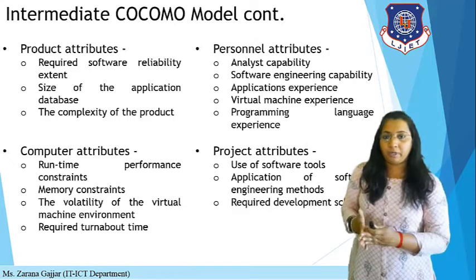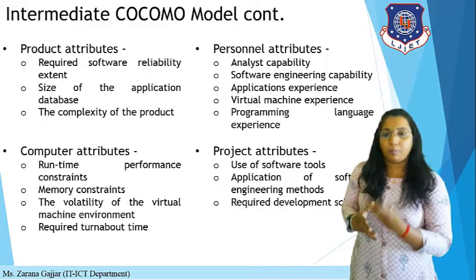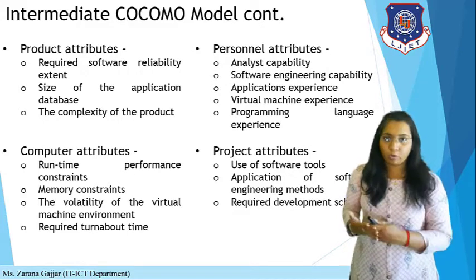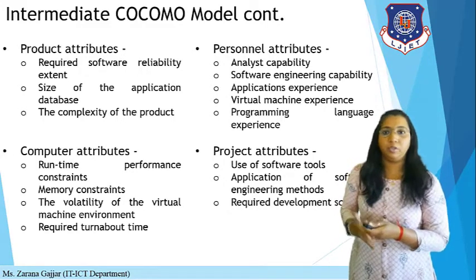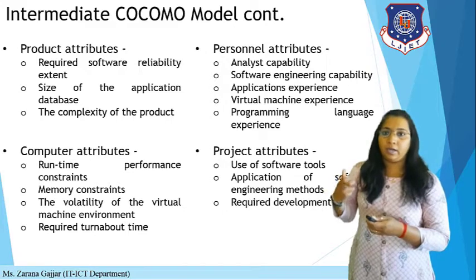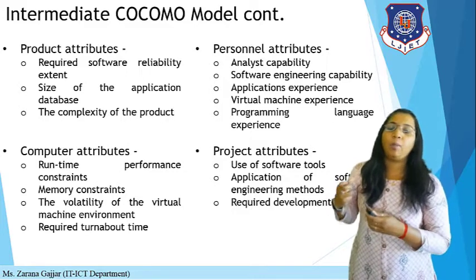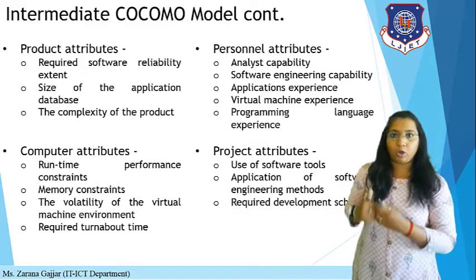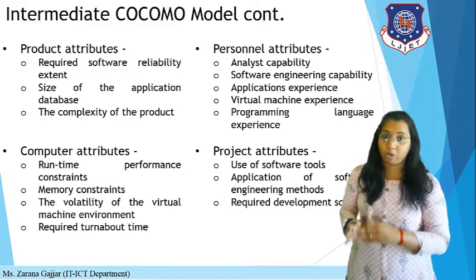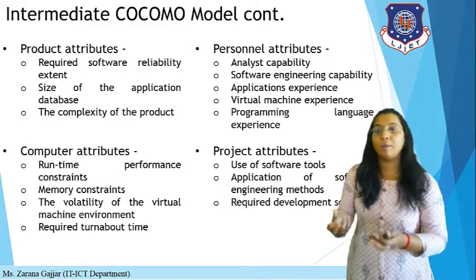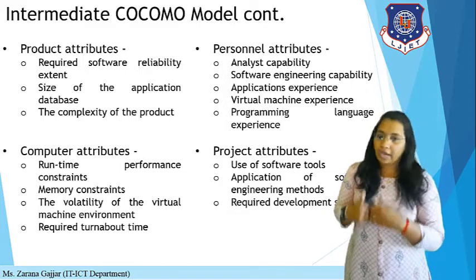The 15 attributes or parameters considered for accurate project estimation are categorized into 4 categories: product attributes, computer attributes, project attributes, and personal attributes. Product attributes include required software reliability, size of the application database, and the complexity of the product — these 3 parameters help calculate the product attributes.